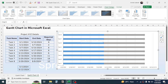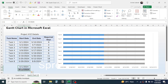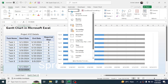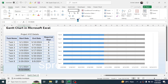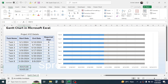Click on the start and end date cells we created here, then convert them to number format by clicking on the Home tab, clicking on the formatting option, and choosing Number. This gives the serial number for the start date and end date. We need to set these numbers in the chart.